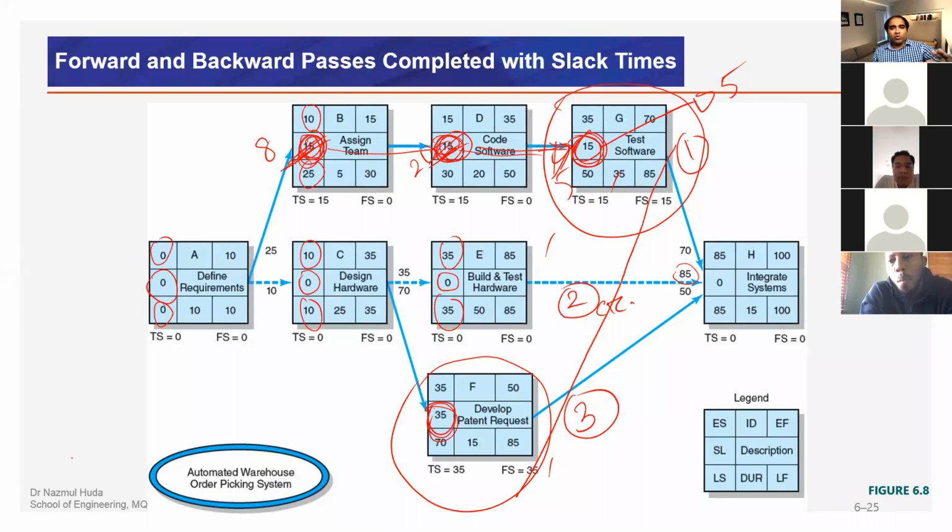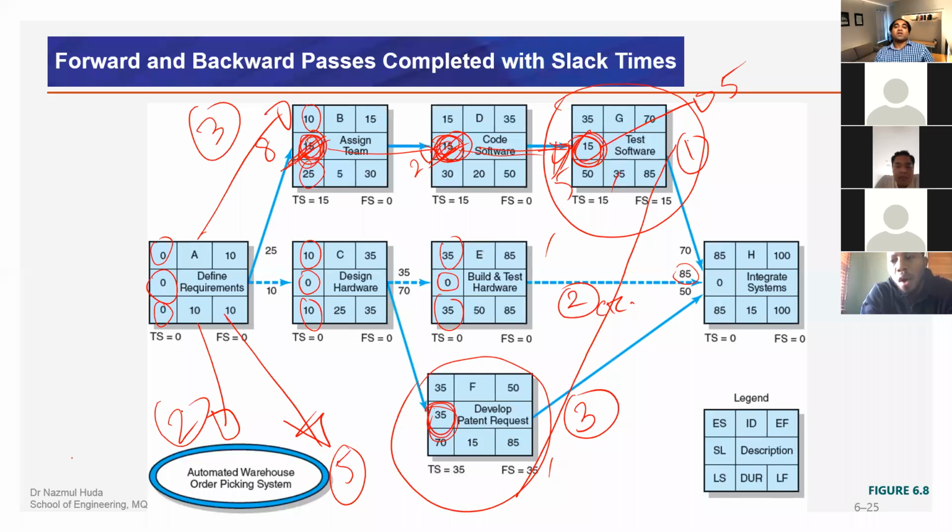Say we have a project network diagram which consists of 10 different chains, and a number of chains have a total slack of 5 days, 3 days, maybe one with a slack of 2 days. This is a highly sensitive network.